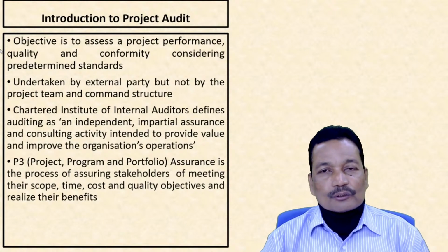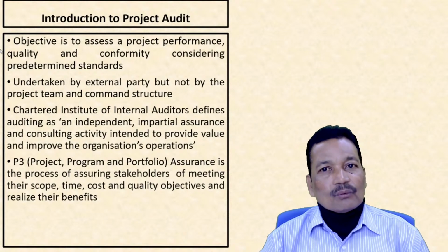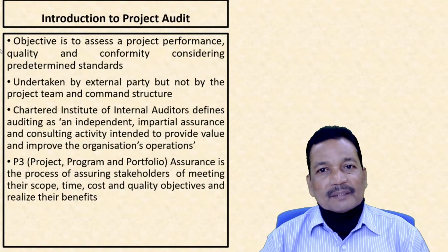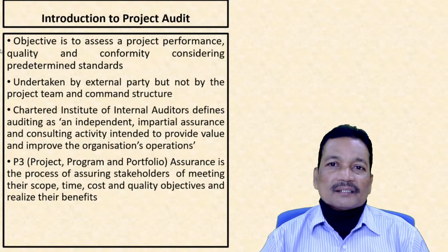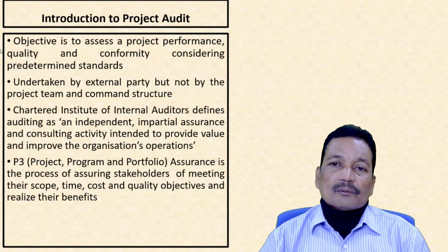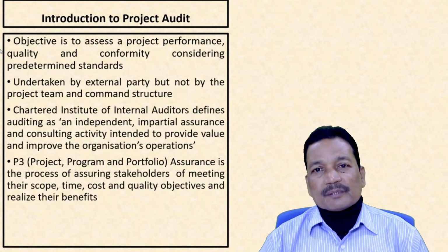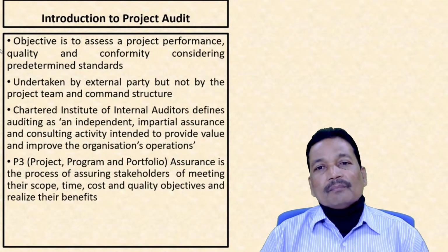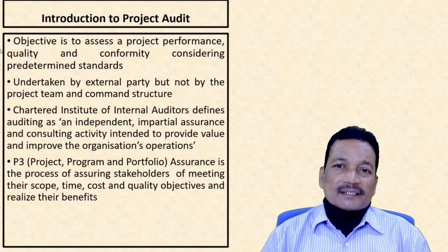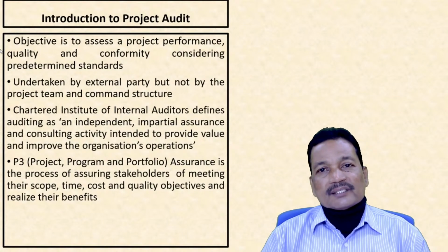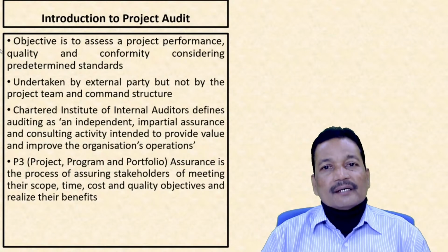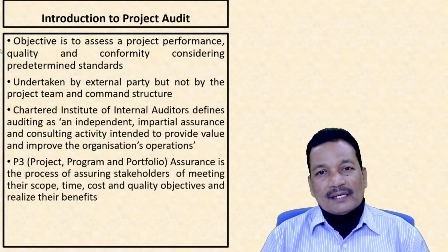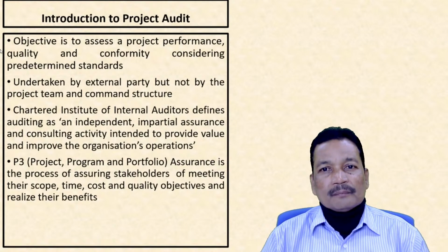Yes, we can also do the audit as the work of the project is progressing. That means in midway or in time periods between the last stage of the financial year, that is the end of the year. So you can have various types of audits, like midway, like at the end of each particular period of time, or another one is at the final completion of the project.